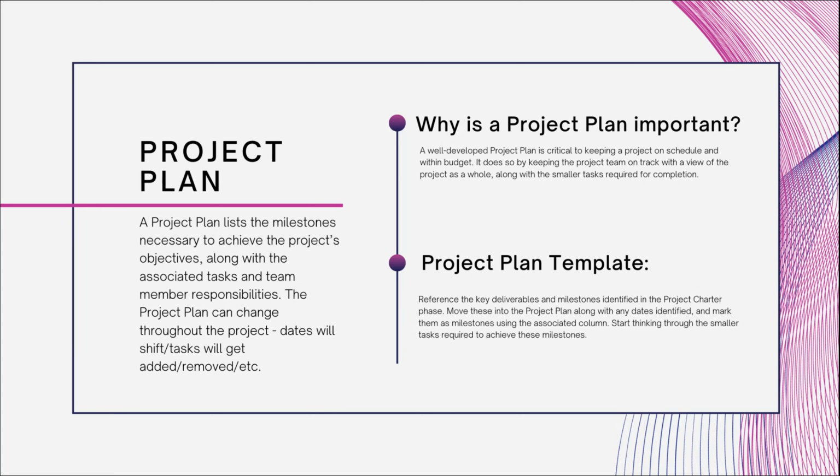The key deliverables and milestones identified in the project charter phase, you see all of that in the project plan. And so you move these into the project plan along with any other dates that will be identified. That's like the basic, right? Once you have some dates from the project sponsor, you'll be able to put all of that into the project plan and you start working on that. That's like the foundation of your project plan.